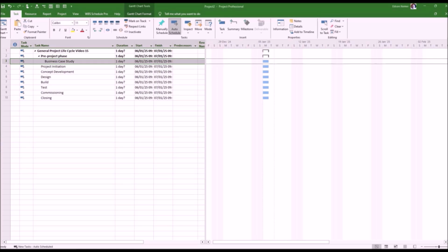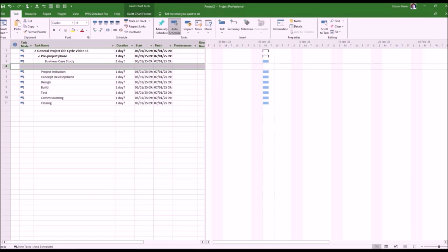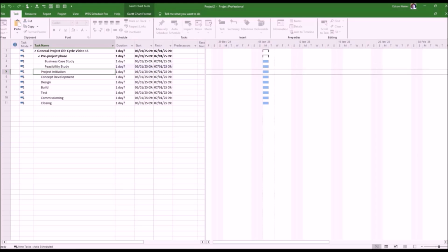The second deliverable may be feasibility study. A feasibility study evaluates a proposed plan or project for its practicality and viability to determine its success. Feasibility analysis is used to determine the viability of an idea by analyzing the technical feasibility, financial feasibility, and operational feasibility of a proposed project. Once your business case has been given the green light, dive into assessing the likelihood of your project's success. This study balances potential risks and limitations with expected benefits, helping stakeholders determine the viability of the project.